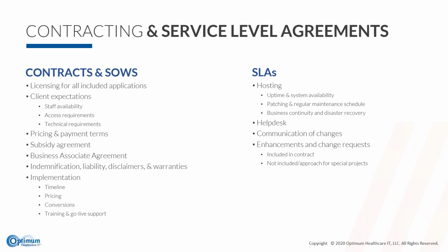So based on host team capacity, what's the anticipated start date? Again, what customization is going to be provided as part of that? What is or isn't provided or expected from the recipient. So areas like conversions, training and go live support, you want to be very clear on what you're giving them and then what that recipient is expected to do. Are they expected to be formatting converted data in a certain way? Probably they're in charge of pulling it out of their system. So you just want to be very upfront on that so there's not confusion about who's responsible for what or what is or isn't included in the implementation and then in the support price tag.